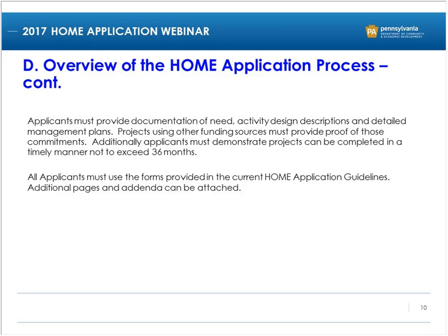If you're coming in for housing rehab, we want to see that you have an inspection service lined up or you have that ability in-house, that you have contractors that are certified in the lead safe work practices, minimum, that you have a radon inspection, that you have lead-based paint assessment capabilities, that if you need to remediate lead, that you have that professional service lined up.